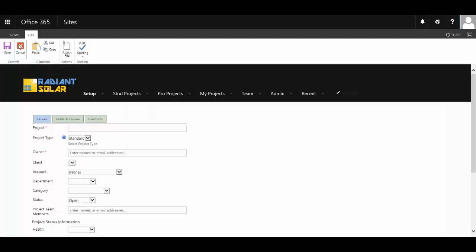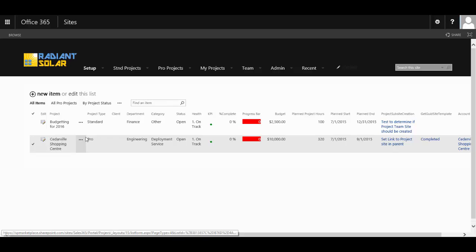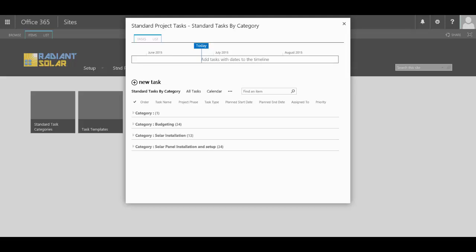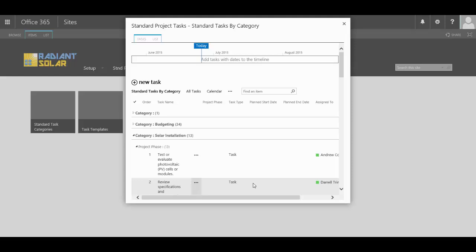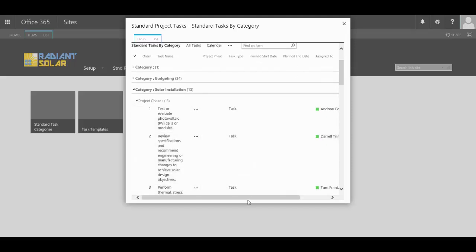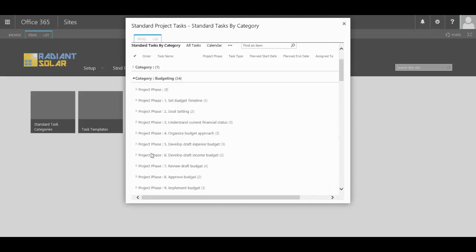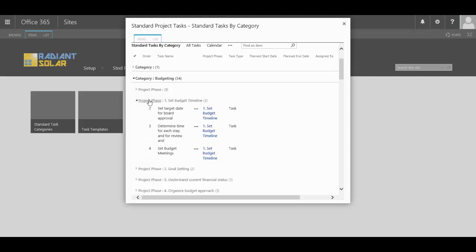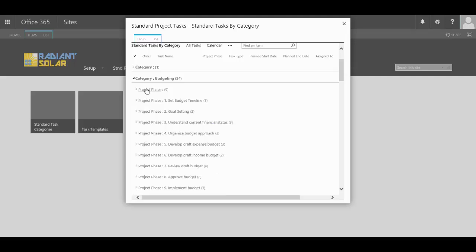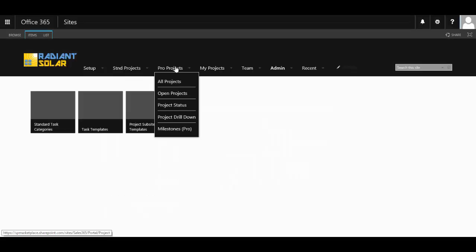Once the project itself is set up, you can add the task templates. These are a templated list of tasks for all the projects that are conducted within your organization. Within these templates, you can even include the people that they are assigned to. You can break them up into different phases as well, and each phase might not only have its list of tasks, but also milestones involved with it.